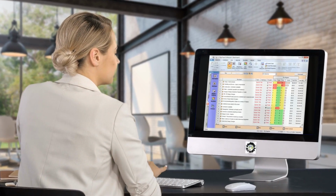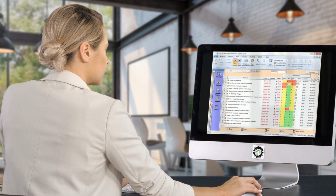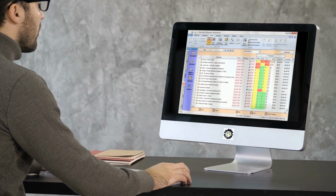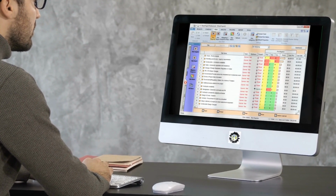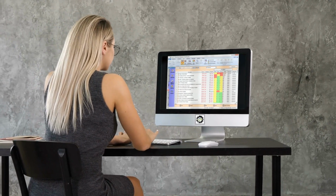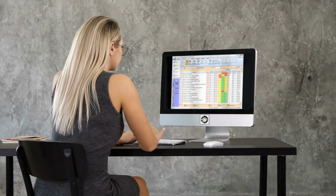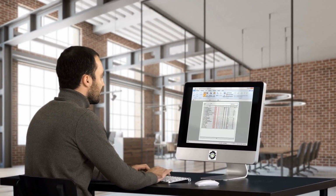A project can be determined to be tracking as planned via a variance report. That's the beauty of a variance report. It compares the planned against the actual outcome, providing a metric to measure if the project is still on track, ahead of schedule, or running behind. The variance report will collect and organize the data on what is being compared, whether it be the budget, schedule, or scope of the project variable being measured.